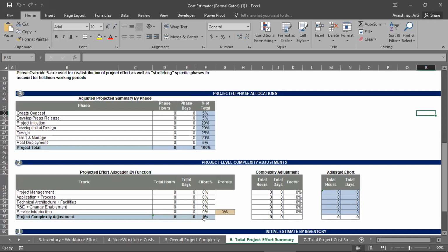So as you can see, the concept is you create the baseline, you put the complexity or the weightage that you want to give to that particular line item, and then use the adjusted cost, which is the feature for this formal gated cost estimator. This feature is completely missing in the informal gated cost estimator. That's a very flat, simple calculations thing. You put a value, it totals it. It doesn't do any weightage, or it doesn't add to the complexity, impactfulness, or risk, or anything.